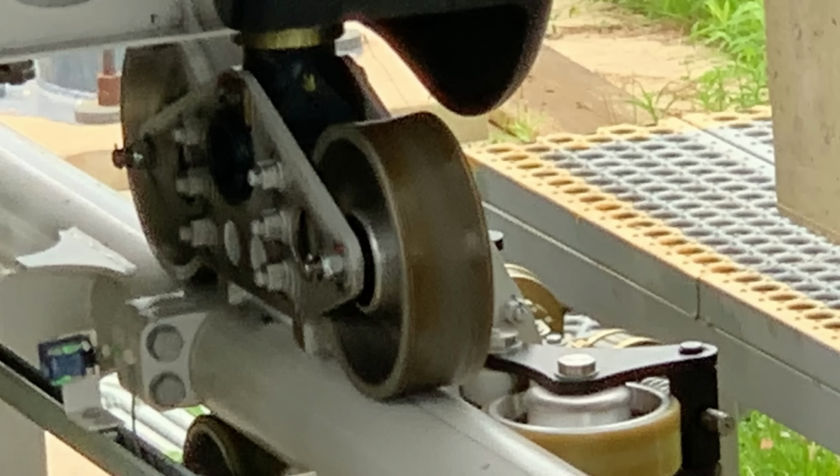out for NDT. Some parks have companies that come in and do the NDT on the spot. That way that stuff doesn't leave. That's the preferred method to do it because the less time you have parts leaving your place and coming back, the less likely they are to get lost, to get damaged, all sorts of other things. You drop one of those pins, it could fail NDT, and then that's really bad news depending on what type of pin it is. You might not have another one in stock, and it might be a really long lead time item where even the manufacturer doesn't have something in stock. So you have to be really careful with stuff when you take it apart and put it back together.